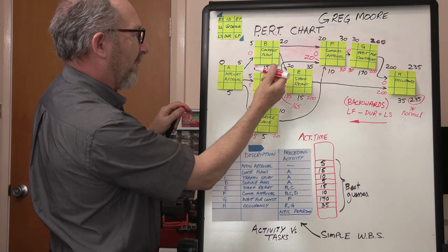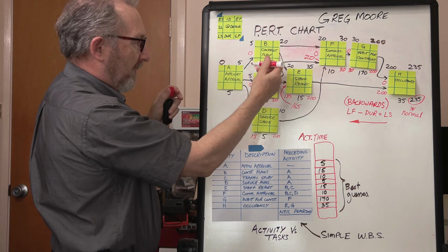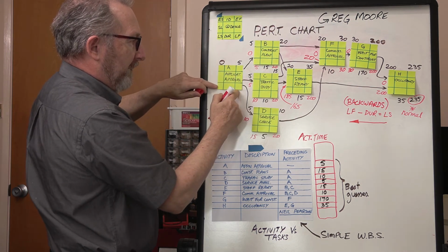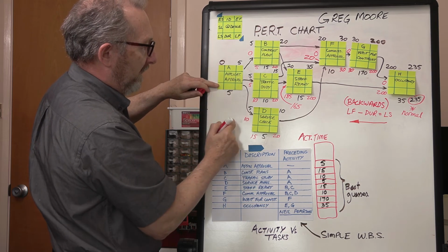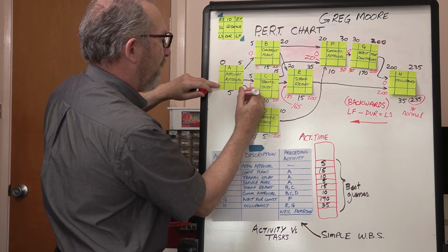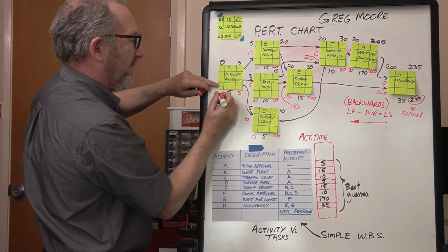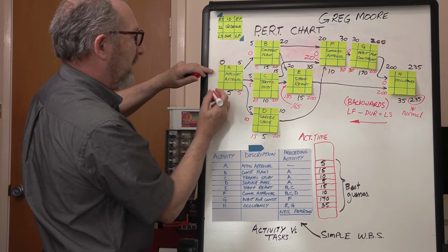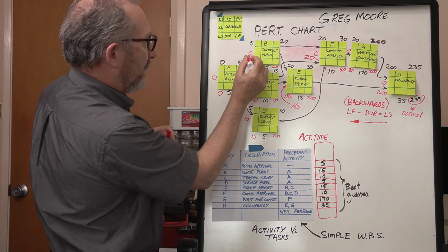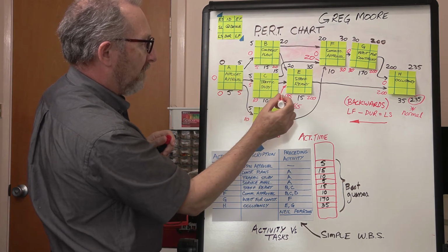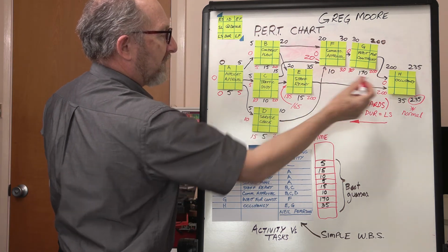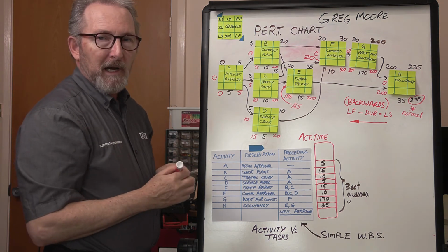Okay, so I have to bring across the smallest of these three because this was a burst. I have to merge these now to get a value to go in here for the late finish, and that's going to be a case of 15 or 10 or 5. It's got to be 5, the shortest one. 5 minus 5 is 0. Okay, there's no slack time there, 0 and 0, no slack time. No slack time, slack time, slack time. A big amount of slack time there. No slack time, no slack time, no slack time. That's our Backwoods Pass finished.